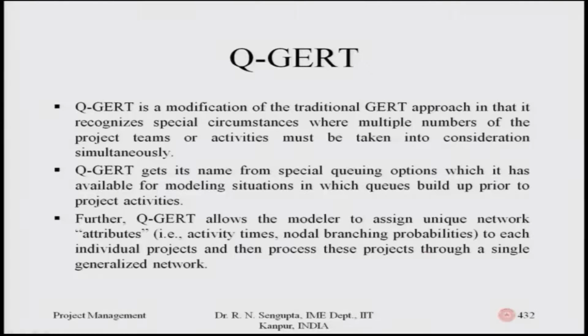Further, Q-GERT allows the modeler to assign unique network attributes, that is activity times and nodal branching probabilities, meaning the probability that the branching will happen or will not happen, to each of the individual projects, and then process these projects through a single generalized network.